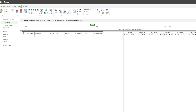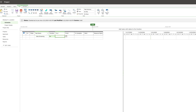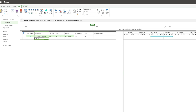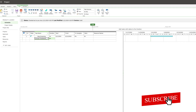Clicking the top area reveals a familiar manual interface where you can add and schedule tasks. I'll add 'Task 1: Idea Screening' and set it to take two weeks. You can see it works as expected. Then I'll add 'Task 2: Concept Finalization,' set it to take two days, and start it after the first task completes.